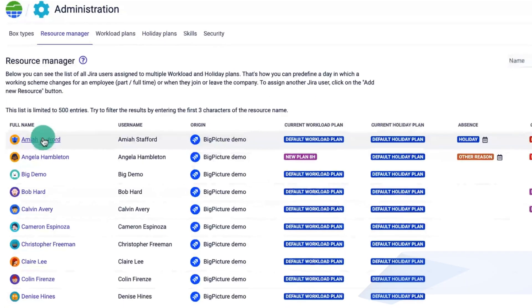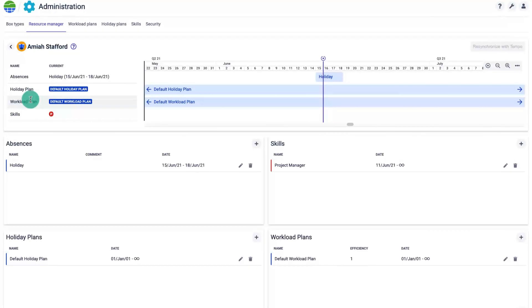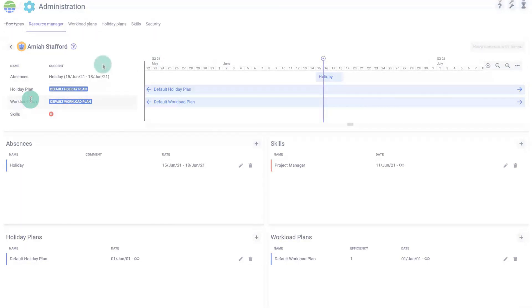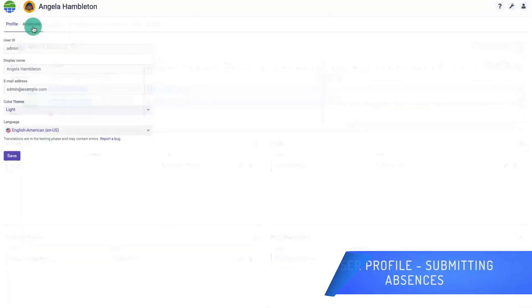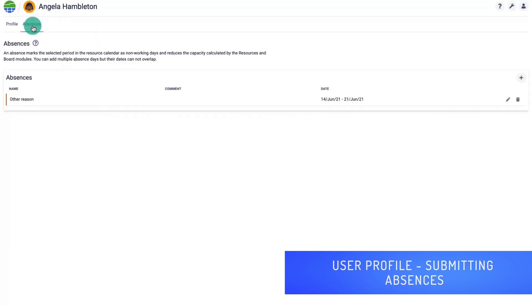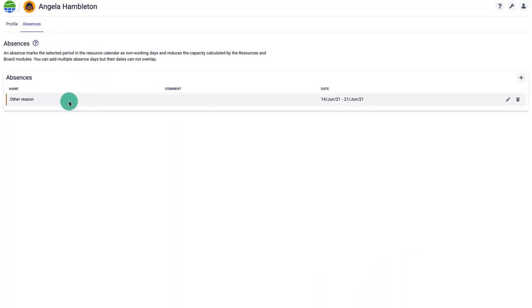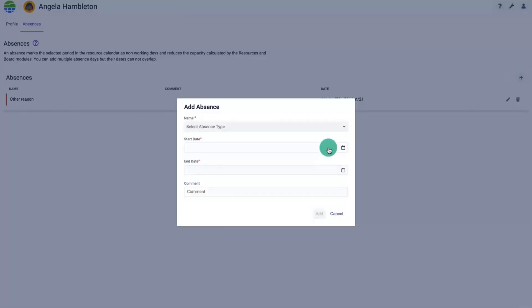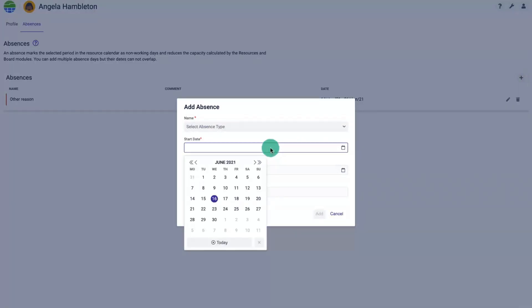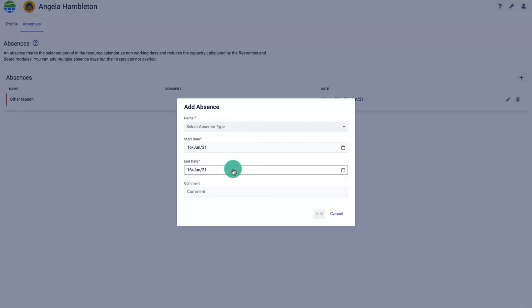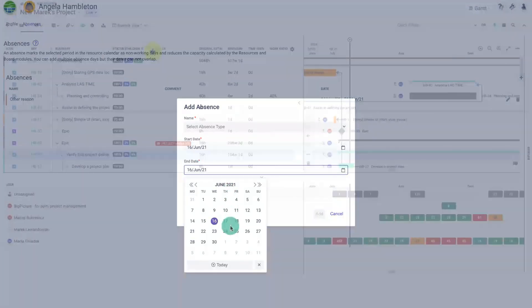Each person or Jira user can be assigned to multiple plans in the resource manager in Big Picture, yet the app admin security role is required to do that. Users can submit their absences directly in their profiles. Please note that a user account can also represent a non-human resource such as a tool, a piece of equipment, or a facility.